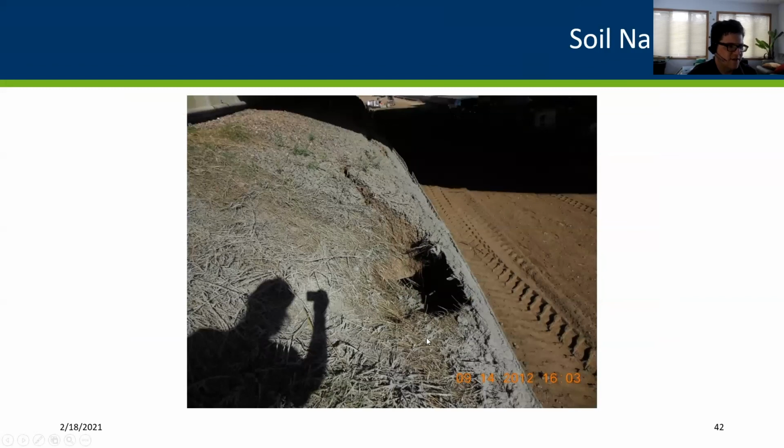And so you'd see something like this. This is not what you should see behind a soil nail wall when it's properly constructed. You have voids that are now going to have to be filled, and the design of the soil nail wall may change. So the construction schedule needs to be strictly adhered to. And if there is any reason why there's a delay, there needs to be a plan to keep that face from sloughing. What are they going to do to keep the soil from escaping and from changing the design of the soil nail wall?